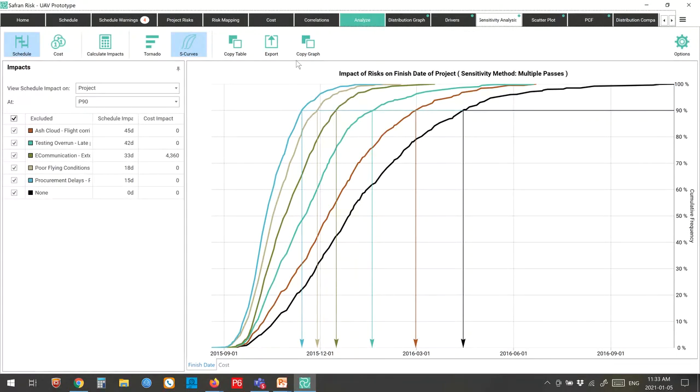Plus, then you've got to model all the cost risks, and those cost risks aren't really schedule related. So you end up having to build a bunch of dummy activities with costs on them. It can be done, but it's a monster. And I've done it, and I would highly not recommend anyone else ever do it.